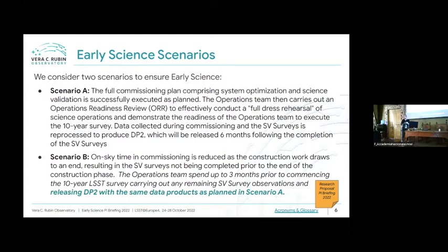No, we would complete the science validation surveys as defined for commissioning in the event that they don't get completed during the commissioning phase. We say 3 months just because we want to time box this. The science validation surveys are planned for 8 weeks at the moment. There's 2 surveys within this 8 weeks. So we think that 3 months is more than sufficient with a small amount of margin, but we do need to time box this. We're not going to carry on for a year.